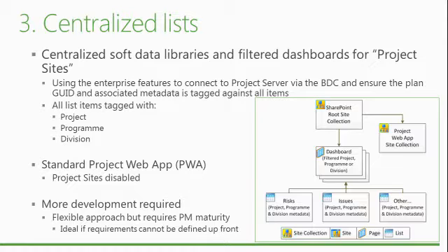if you wanted in a database to have a big list of data and you wanted to associate it and slice it in many ways, you would add a column called project, and you would put the project code in there or the project name. You might put the program against it as well, and maybe the division that you're attached to.